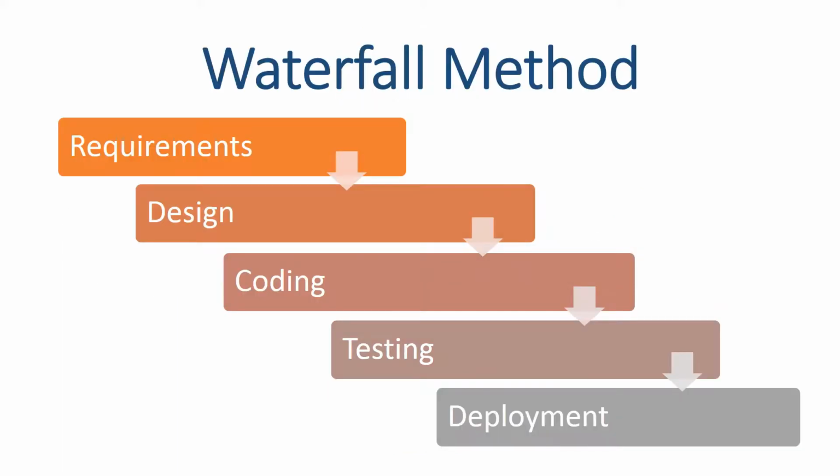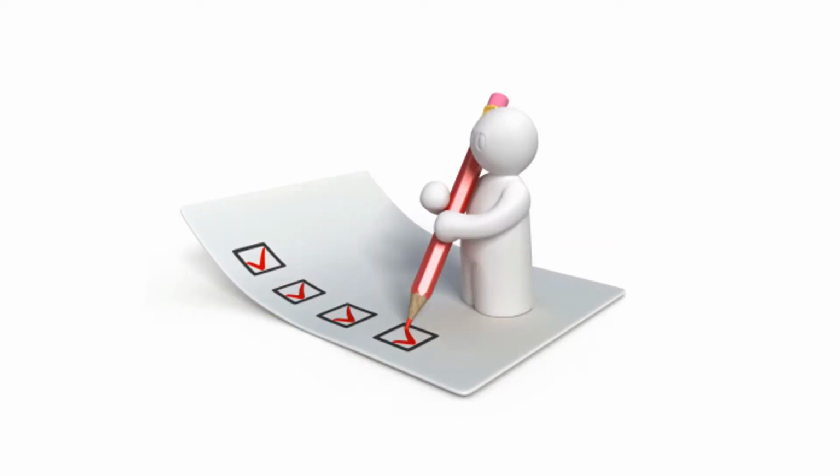progress. Before the use of Agile methodology, software development was accomplished via waterfall methodology, which includes following particular phases of software development in order. The phases include requirements, design, coding, testing, and deployment. In waterfall method, one moves to the next phase only when its preceding phase is complete and verified. Setting the requirements and specifications of the software before starting the development is very important in waterfall method.